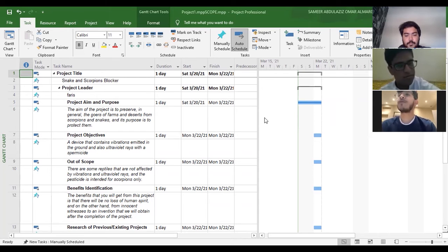For the project scope statement, we have seven items that are important. The first item is the objectives. What are the objectives of the project scope statement in general, not about our project? In a few minutes, we'll talk about our project. The objective in general is the goal of our project. And the second thing, the product scope description. It's built on top of the information from the project charter and requirement documentation.